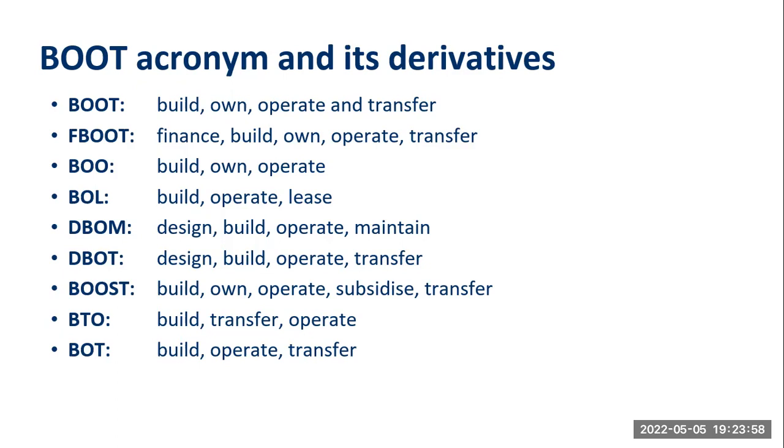In case the investor or the project management company is responsible for looking for finance for the project, then the finance will come in, then it becomes a BOOT. If you are not responsible for looking for finance, then it's only the BOOT. Then you have the BOO without the T, that you build, you own, and you operate. In that case, you are not going to transfer it back to the owner or the client. You own it probably forever.